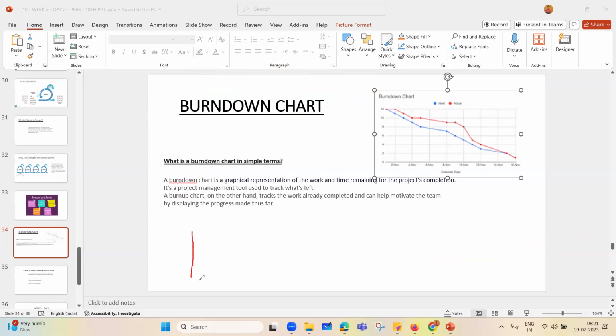The artifact says that initially you are having the product backlog. These product backlog items get entry into the sprint planning, and there you give the input. Whatever the PBIs, product backlog items, are there, you break them down into multiple user stories. Each epic will have its user stories.